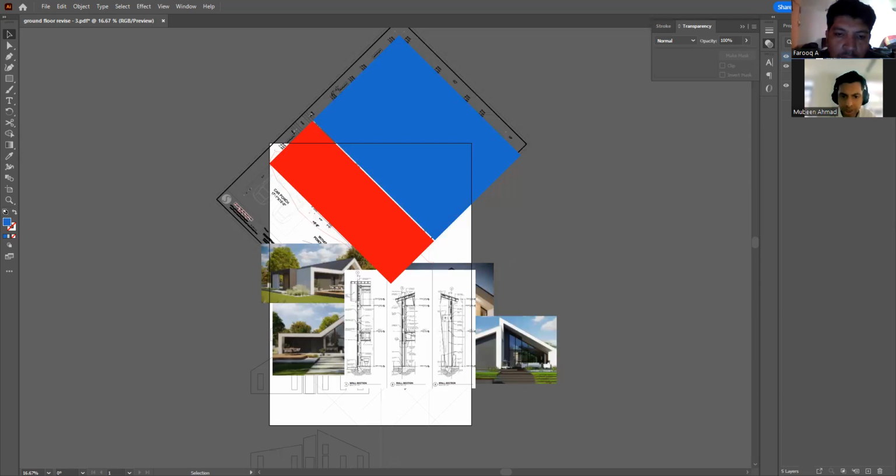I will send you a contract. Sure. And only for the 3D or the structural drawing as well? You still have to quote for that. I'll send you the quotation for the structure drawings. I'll send you two quotations, one for the structure and one for the 3D, based on what we discussed today. I will also list down all the set of deliverables so you know the timeline, what is being produced at what point, and then what you need to do after this is delivered to you.